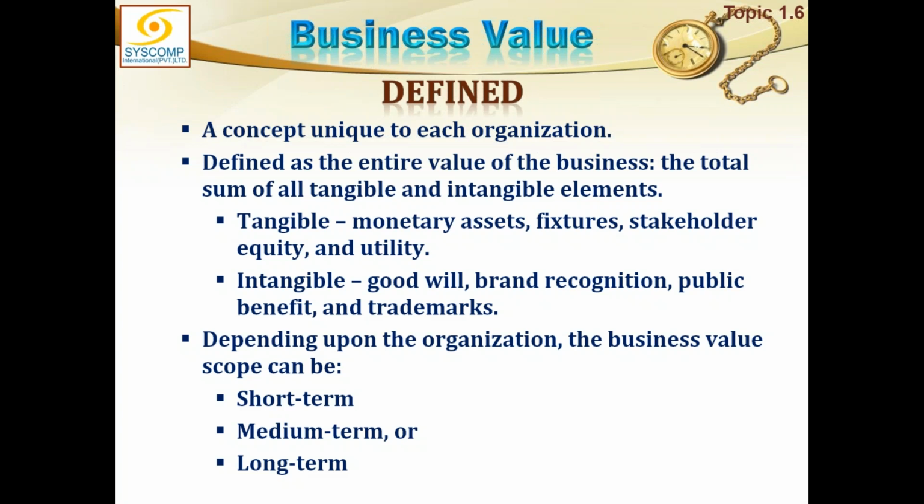So, I may like to break this 50-year time into maybe 5-yearly periods. And after every 5 years, I will achieve certain milestones. And if I keep meeting those milestones, after 50 years, I would have achieved this target. And within every 5-year medium-term objective, I want to have my yearly objectives defined. So for the first 5-year plan, I have got these. First year, I will accomplish this. Second year, I will accomplish this, and so on.